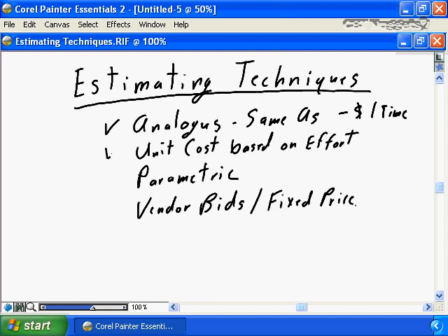You may be able to develop your estimates based on a unit cost based on effort, i.e. you have already gone through your detailed time analysis. You've already allocated specific work estimates to each and every unit of the work breakdown structure. Maybe your cost estimation is as simple as determining the unit cost, remember the direct cost and the appropriate indirect cost allocation for each and every team assignment, times the effort assigned in the work breakdown structure to come up with the cost for the task.